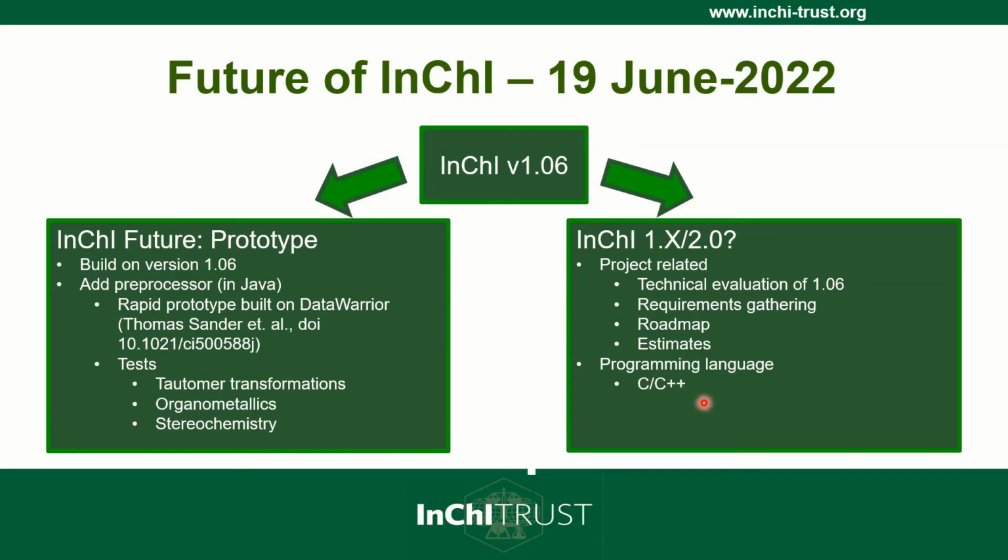So while we are going to test, on the one hand, we are creating more traditional development methods that are nowadays standard. So please, not an ivory tower again, but let's have standard development using agile methods, so that we've got smaller sprints. Meaning you just work for 2 to 3 weeks. You define your work even for 2 to 3 weeks, and then after that time, you're going to test the stuff, and then you define what has to be done in the next round.